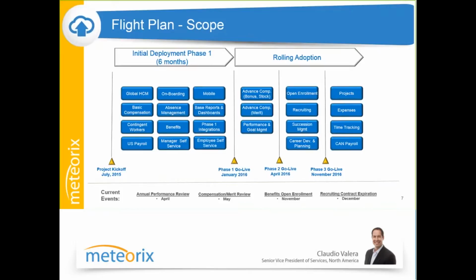So understanding that and taking that into account, there's very little advantage to implementing those components during the original go-live for a couple of reasons. One is you're putting more onus on the initial deployment and the team that you have to deliver those particular products and test those and make sure that they are ready for launch.